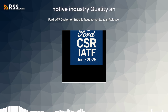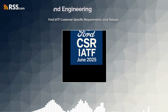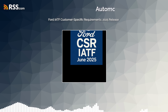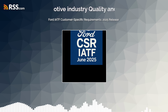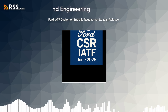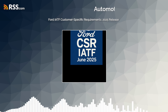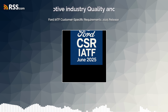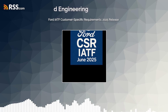They all need to talk to each other. And there are specific acceptance requirements from Ford for these documents. It's not just submit and forget. No, definitely not. Particularly for those critical characteristics. PFMEAs and control plans for S parts require formal acceptance, not just review, but documented acceptance from both Ford Engineering and Ford SDA. Both. Engineering and SDA? Both. And for design-responsible organizations, their DFMEAs also require formal acceptance from Ford Engineering. This acceptance is required not only for the initial versions, but also for any significant revisions.